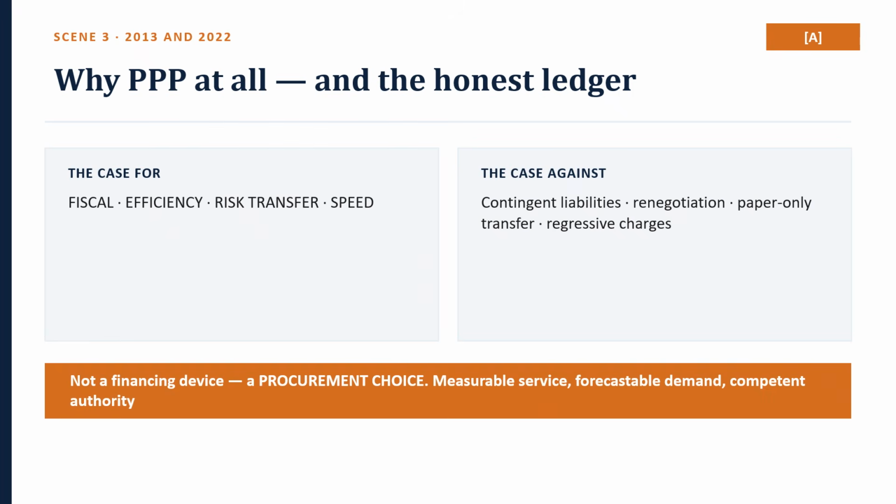It is current, it is official, and it directly answers the question. Factors to be considered and name the standardization India has built: model RFQ, model RFP, model concession agreements, sector toolkits for roads, ports, solid waste management, and water and sanitation, and a reference guide called the waterfall framework for choosing the implementation mode.